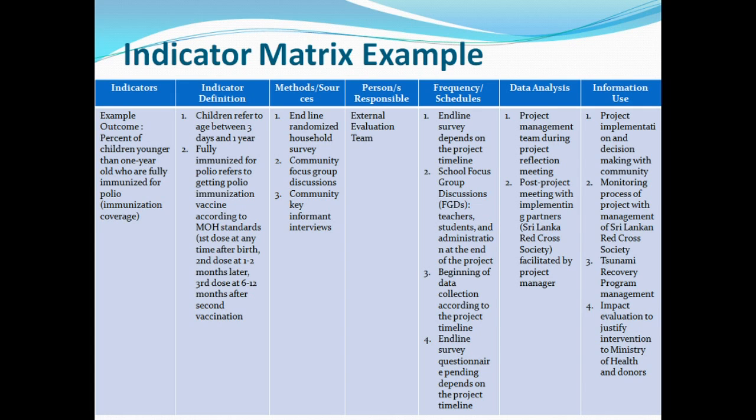Now, when planning for data collection timings, you need to consider factors such as seasonal variations, school schedules, holidays, and religious observations. So if you are, suppose, collecting data in a Muslim country, you would need to keep in mind that there may be the month of Ramadan. It's the whole month people fast, so it will be difficult for you to collect the data. So this information is also relevant, and you need to keep it in mind.